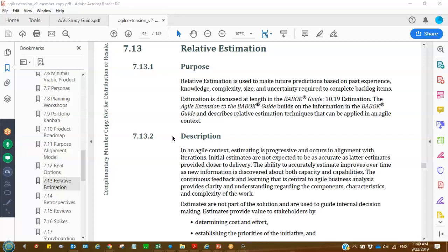Understanding that people, when they're trying to do predictive planning, are always going to be padding things. They're always going to be putting things on. And what this critical chain did was to say, okay, take your critical path, cut it in half, and then say there's a bucket that's out there that is called the contingency, so that your overall project time is made up of your critical chain, which is your minimal amount of time to do things, plus however much of your contingency bucket you use.